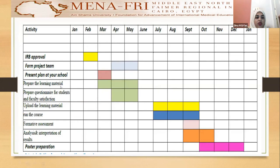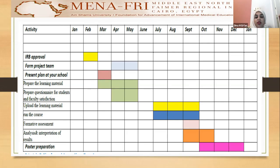About the GAN chart: first of all, we acquired the IARP approval in February. We formed the project team and presented the plan at our school in March. We prepared the learning material from March to May, and we also prepared questionnaires for students and for the faculty regarding their satisfaction about the online course. Uploading the learning material and running the course was from July to September.